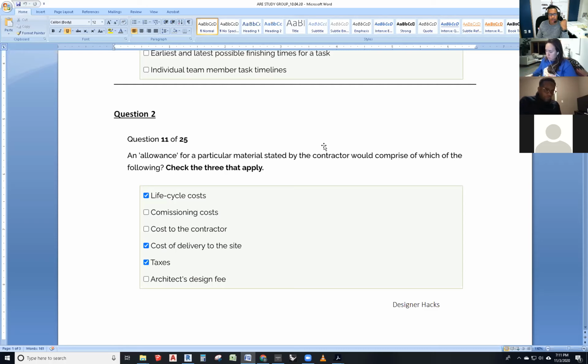Okay, so that's what that is. So on my job, I set a unit price for flooring. It was gonna be $2 per square foot of flooring, and I didn't know how much it was gonna be. So when I did my math in Revit for how much flooring was gonna be, I didn't account for waste. It was gonna be 15 or 20% of waste because you got to cut some of that flooring. So whatever the price ended up being.